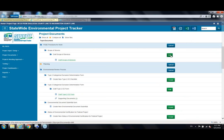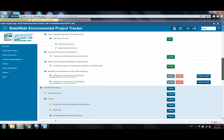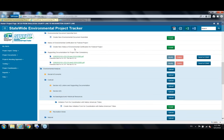Moving down the page, you have project schedule data coming from the PSM database, imported nightly. The date shown reflects the most recent export file — not a live connection. As scheduled dates are updated in PSM, they're pulled in nightly. Green means the date occurred on time or early; yellow means behind by less than two weeks; red means more than two weeks behind schedule; and 'A' means the date has been actualized.